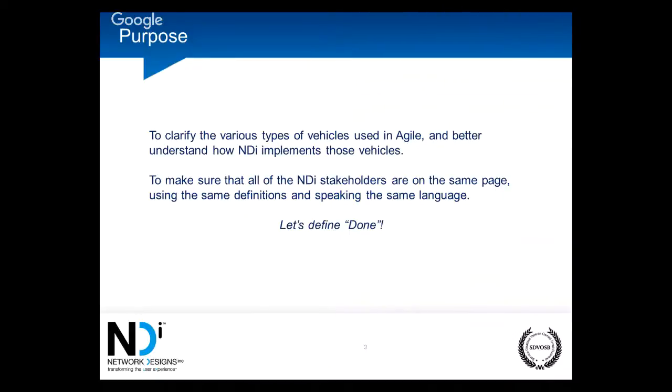An example I would use is a developer saying that task is done or that element is done means that he's written it, he's probably unit tested it, he's probably got it pushed over to QA, but in his eyes it's done. The same definition would not apply to the PM, for example, who's going to sit back and go, well, that's not publishable, it's not a release component yet because it hasn't gone through all of the various external testing components. It hasn't been unit tested properly by the QA department. It hasn't been 508 tested or UX tested or user acceptance tested, any of these other elements. So we can't guarantee that it's going to work the way that the developer says it does on his machine. So it's not done in the eyes of the PM.